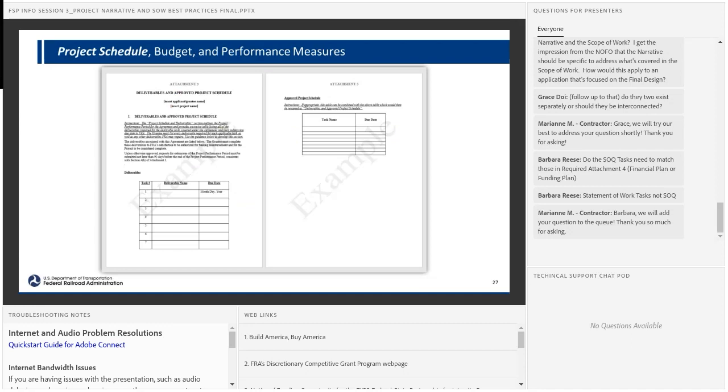All right, the next attachment is attachment 3, project schedule. You can see here there are 2 separate schedules that we use. The first one is the deliverable schedule. When you're completing this for your application, deliverables is sort of paper documents. It's not milestones. Milestones go on the next table. So the deliverables table on the left would generally be, for example, task 1, project work plan, task 2, project agreements if you need them.